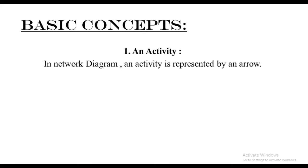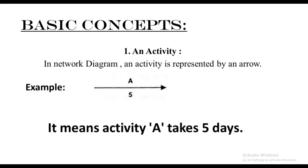Number one: an activity. In a network diagram, an activity is represented by an arrow. For example, we can see an arrow with an alphabet and a number, which represents that activity A takes five days to be completed. So always remember, while drawing a network diagram, the activities will always be represented by an arrow.